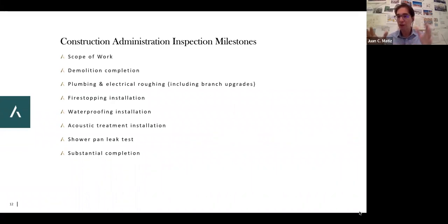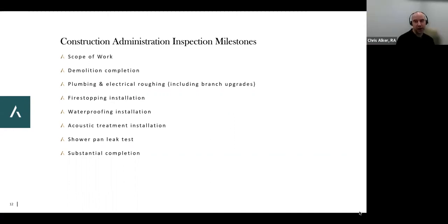But it's fairly limited, but you do need to hire professionals that are independent from the contractor who are going to come and check the work. And again, that's another checks and balances that exist. So it's another person that you have to hire, because they're basically looking at the work of the contractor and making sure the contractor followed your drawings, the architect's drawings.